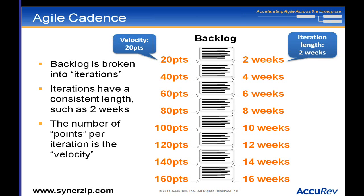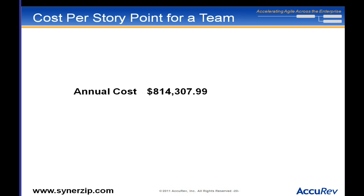Now that I have my backlog, iteration length, and velocity, what's next? I can calculate the cost per story point for a team. I go to my CFO or controller and say, 'I've got this cross-functional team — they may be virtual but all working on the same project consistently.' The fully loaded cost for this team is a specific dollar value. This is actually a real dollar value for one of our agile teams here at Accurev, consisting of a number of developers and QA folks.